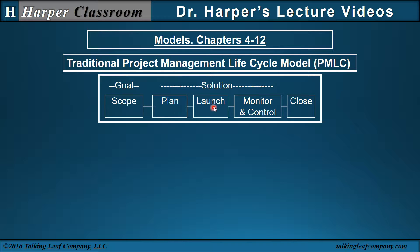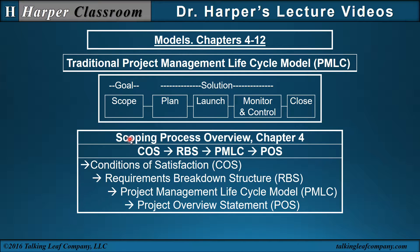He develops the content in each one of these phases, which is a little different than PM Bakken. For example, in scope, the scoping process overview in Chapter 4 starts with the COS — conditions of satisfaction — which define the necessary elements of project success. Then the requirements breakdown structure lists the details of the requirements that describe the conditions of satisfaction. And then the project overview statement, which can be described as an executive summary of this information, is similar to a summary of the scope statement and the charter in PM Bakken.